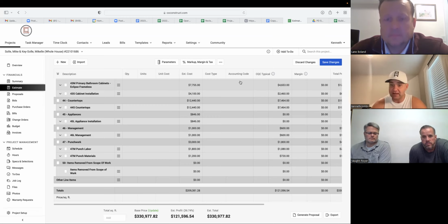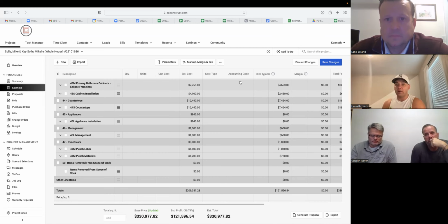They meet with the PD and they say, we think this is not enough money. If that's the case, then they go to the client and say, your budget's 380. Now that we've had our architect, our designer, everyone look at this job, and we've done more homework, and we're that 30% of the way, we think it's going to be more expensive than what we thought it was, or we're on target.